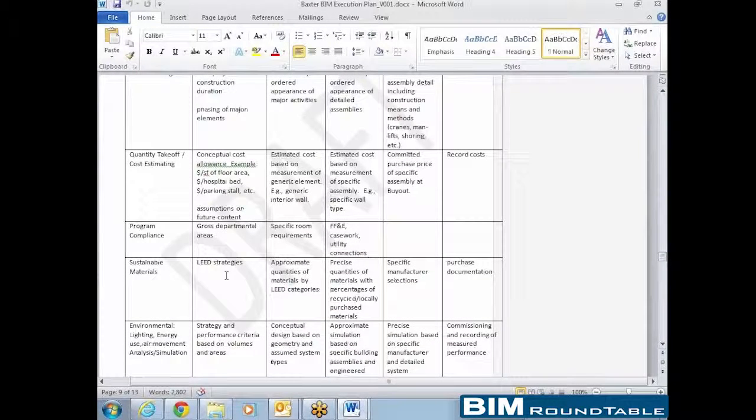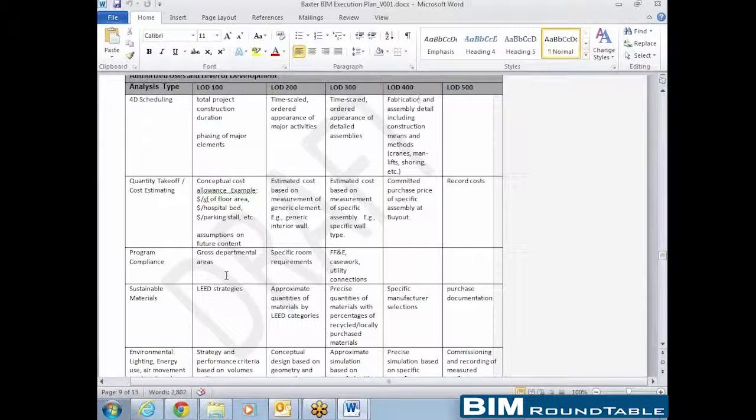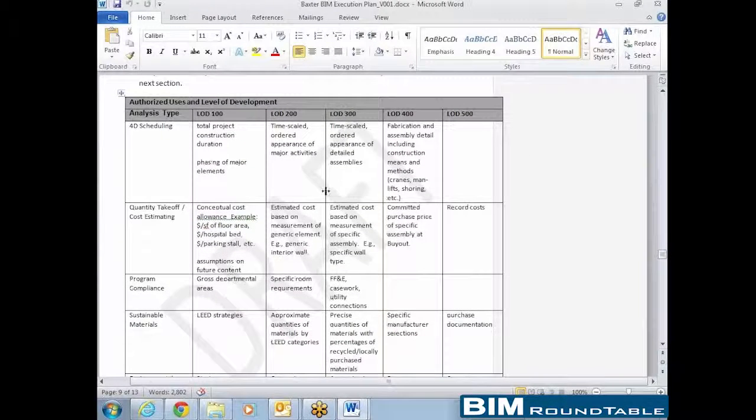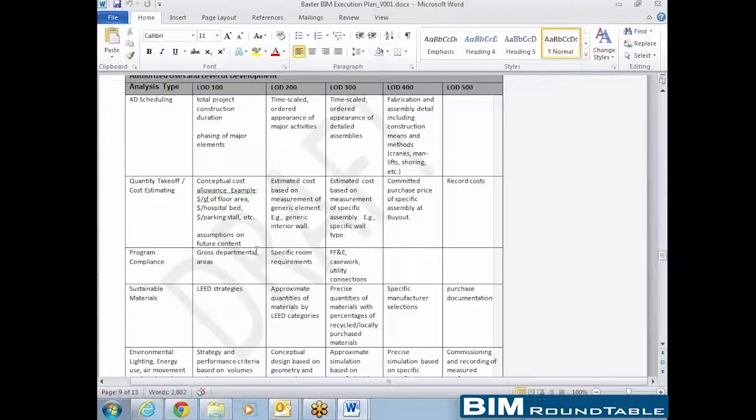How much work do you have to put in to get the models to the point where you can do some of that cost estimating, quantity extraction? Quantity extraction, I think at level 200, 300, where it has enough to be able to pull good numbers. It's not just based on the model, it's a combination of the model and whatever software you're using for that. We've been using one like this, and we're starting to integrate that one. They're very good at what they do. They still have some bugs to work out.